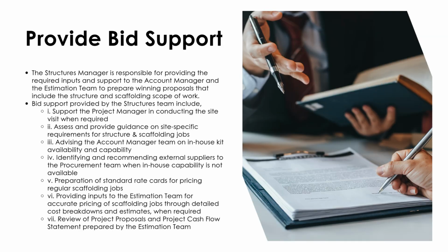Provide bid support. The structures manager is responsible for providing the required inputs and support to the account manager and estimation team to prepare winning proposals that include the structure and scaffolding scope of work. Bid support provided by the structures team includes supporting the project manager in conducting site visits when required, assessing and providing guidance on site-specific requirements for structure and scaffolding jobs,